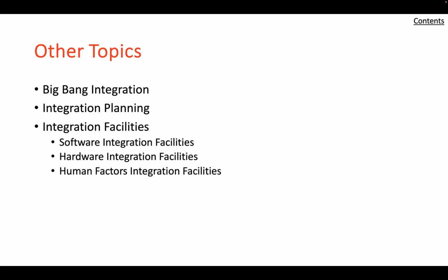So for the Big Bang approach, this approach is sometimes referred to as the global integration, as all the elements are integrated in a single step. The feedback is immediate to determine if the integration is successful, and little planning is required for the integration. This approach may be difficult to show where any integration faults reside within the system configuration after the assembly. This approach is good for systems that do not have a large number of components, and subsystems have simpler interfaces.